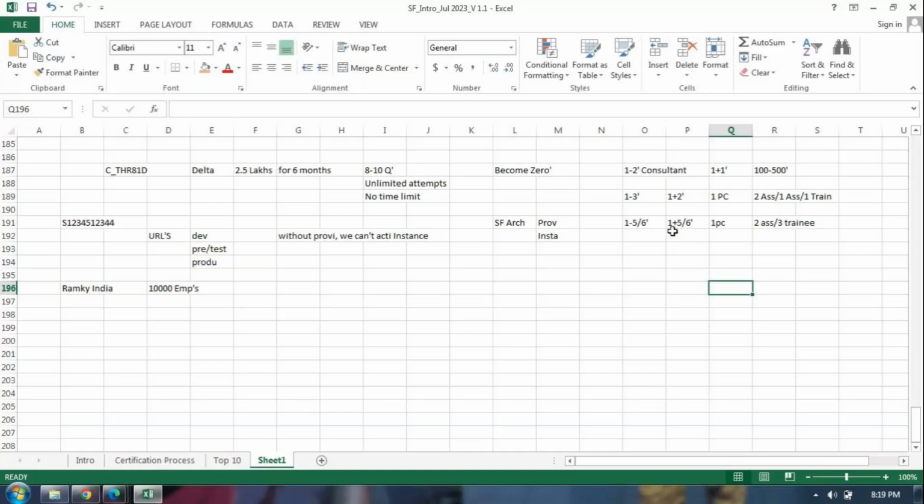This is the concept. If you go by a small scale project, it is hardly 8 to 10 months. For medium scale, 12 to 16 months, which means 1 to 1.5 years. For large scale, 1 to 2 years minimum, sometimes plus or minus 2 months, which means 24 to 26 months, guys. This is the way.